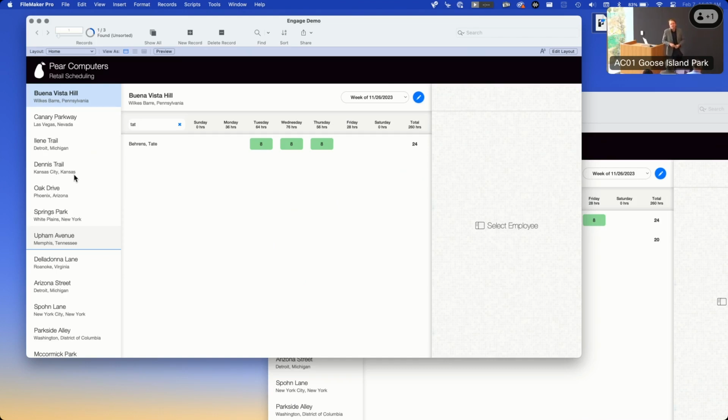I'll give you the prime example of the first project I used it on. It's a project management tool. They're managing purchase orders for a project. They could have a couple dozen purchase orders for a given project, and each of those purchase orders is quarterized, as in a certain amount of its value is being spent in a given fiscal quarter. All that quarterization needs to add up to the total of the PO. Always. It can never not add up to the total of the PO. Because I can validate in real time, they can be adding those numbers, and when they go to hit save, I can say, no, the third PO here on the list, the quarterization total doesn't add up to the PO's total amount. You've got to go back and fix that before I even let that get into the data stream.